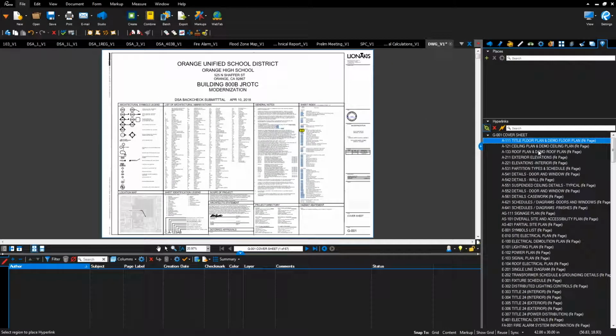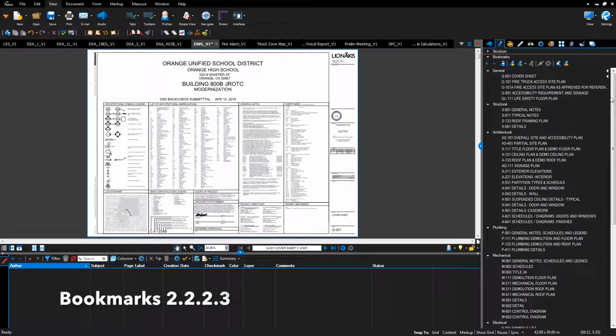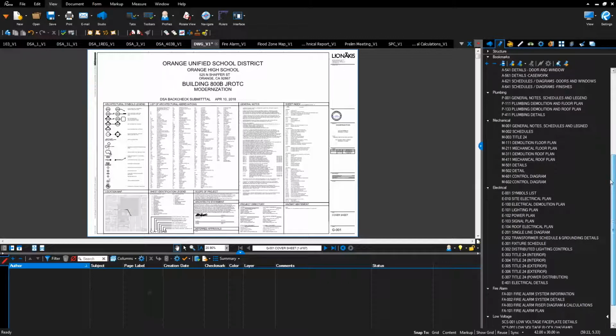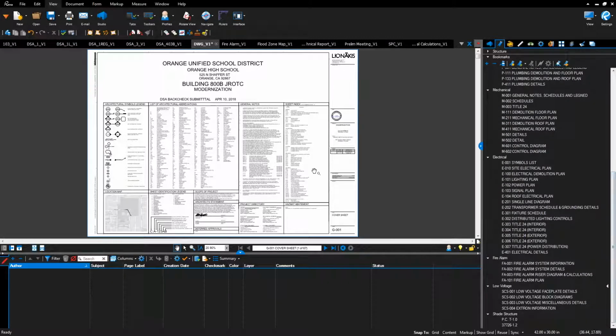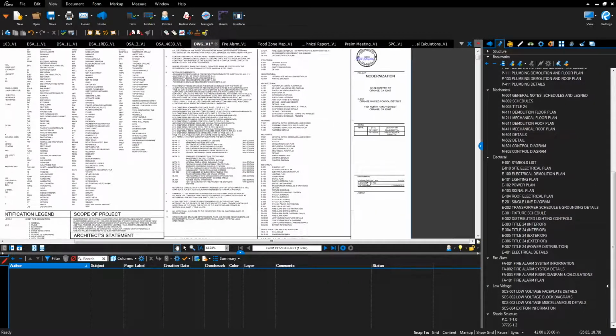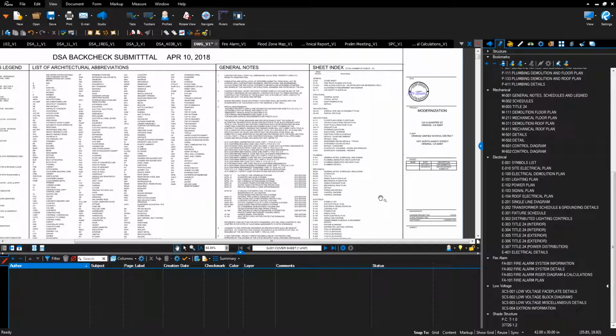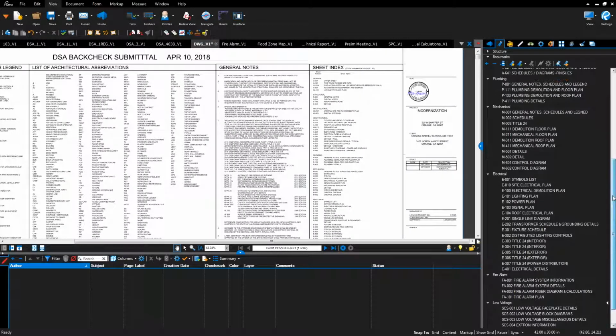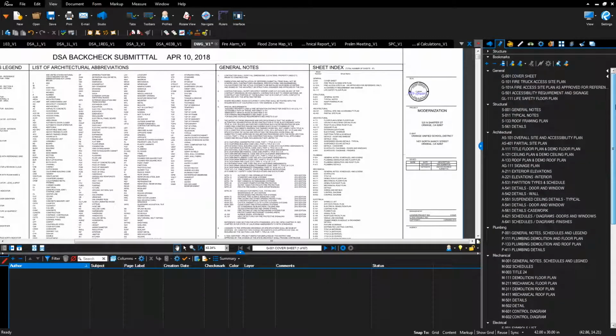Verify drawing preparation. Confirm that a blank stamp area has been included on each page of the document for the DSA digital identification stamp. View bookmarks. Confirm that bookmarks match the index sheet of the drawings. Click the Audit Bookmarks button to verify that there are no broken bookmarks.